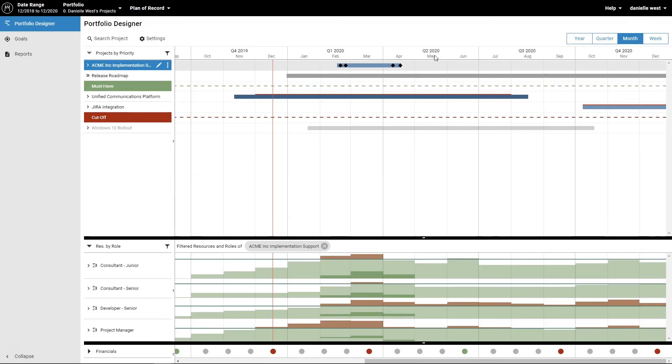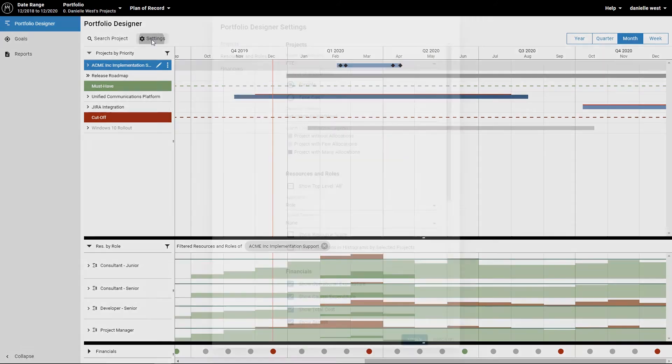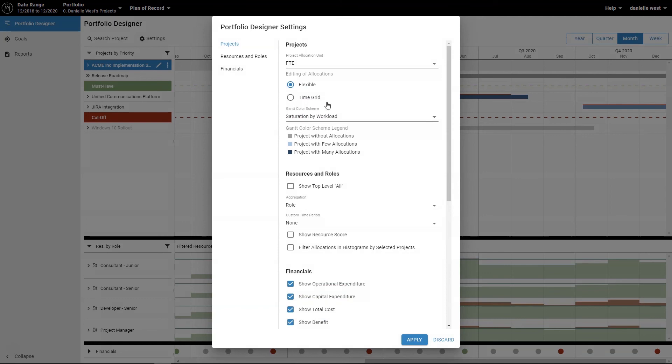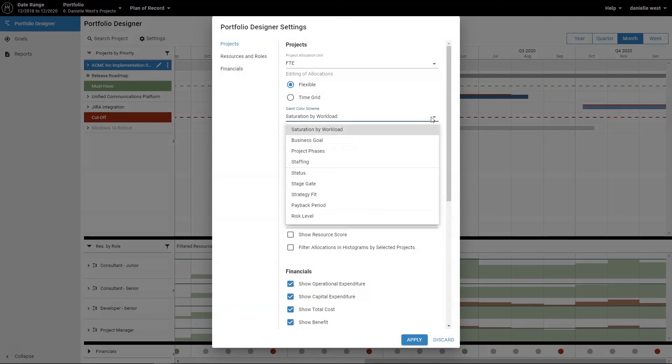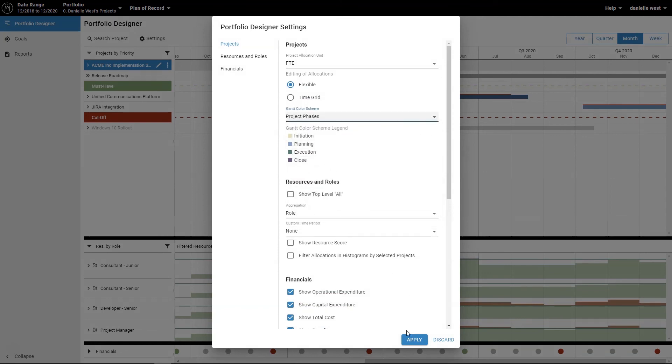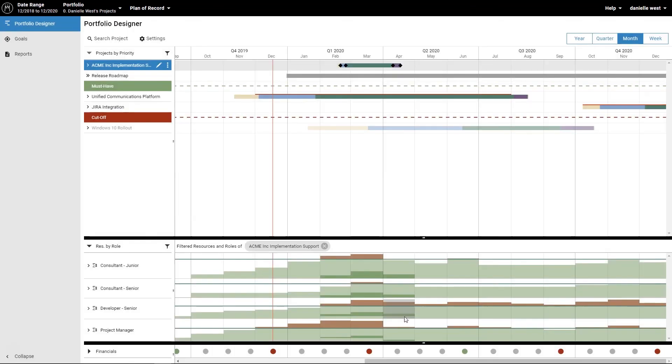You can also visually map the project phases in the Gantt chart. To do so, click settings in the toolbar and select project phases as the Gantt color scheme and click apply. The individual project phases will now be displayed in different colors on the Gantt chart giving you a clear overview of the timing of your projects.